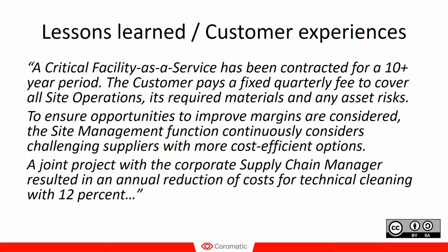So the site management team running this contract, they need to ensure, of course, their opportunities to improve margins. And what they continuously do then is to challenge their suppliers to see if they can find more cost-efficient options. And what they did after a few years was that they ran a joint project with the corporate supply chain manager, which resulted in an annual reduction of costs for technical cleaning with 12% in this contract.